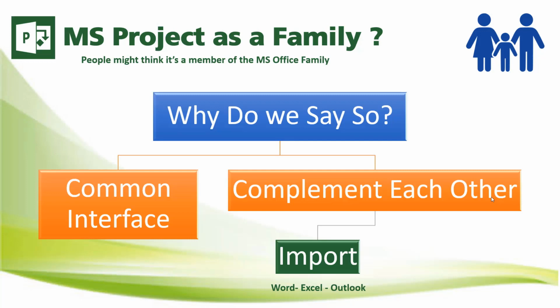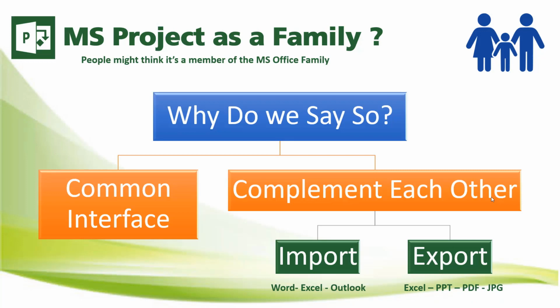If you create a project, then you can send the project report out and share it with people who do not have Microsoft Project by exporting the project report to Excel, PowerPoint, PDF, or even a picture. Whether you are importing or exporting, you have to map the predefined, or built-in, field names in Microsoft Project to the column headers in other applications, and this is what we call a data map. So you have an import data map or an export data map. It's all about matching the predefined field names in Microsoft Project to the column headers in other applications.